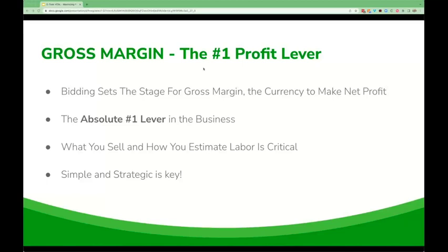In fact, all of the profit magic that happens in an integration company happens at the bid stage, the first stage of the game. You see, the gross margin on your equipment is pretty well defined. Most of us, under normal circumstances, know what we buy it for and what we sell it for. So equipment, pretty clear as to the gross margin we expect to make. Parts can be a little more nebulous, because parts are typically bought and sold in bulk. Their usage is rarely tracked from job to job, and they experience frequent price changes, oftentimes upward.